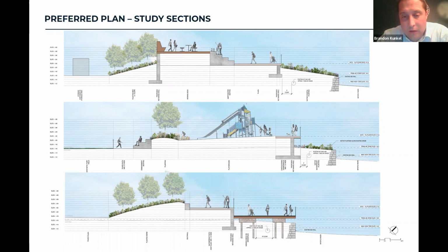And it's actually a relatively shallow pipe. It's only 3 feet deep. So in order for us to get the structural stability of the new seawall, we need to be offset from their gas line, just from settlement and pressures on that gas line. But you'll see, particularly in the top section,